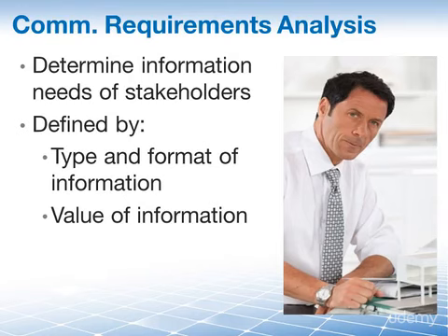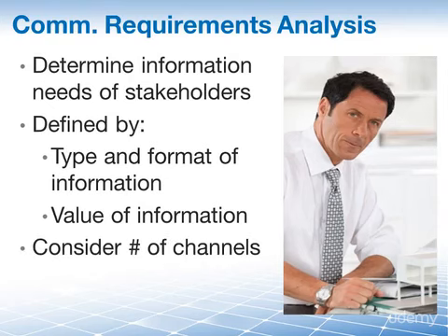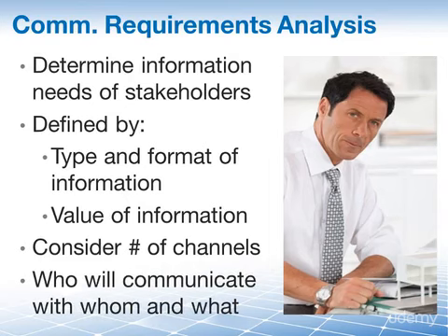In the analysis, the project manager needs to consider all the communication paths and channels, as this gives an indication of the project complexity with regards to communication. The more channels, the more people interacting you have, the more complex project communication gets. And finally, the requirements analysis is a key component of communications planning.